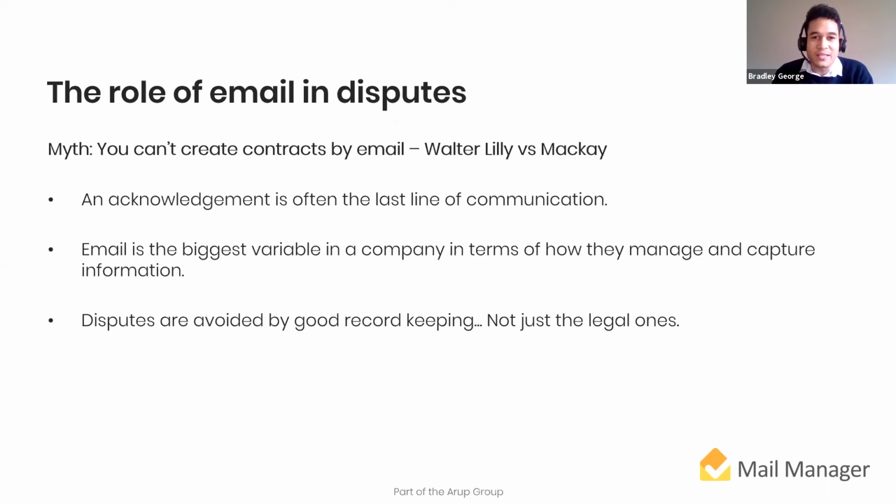People don't often realize how important emails are until they essentially have to go back and find one, whether it's receiving a critical document during the project or having to go back a few years to see who was speaking to who, or who authorized this or that. Email is now the biggest form of communication on a project. However, it's the one thing people tend to manage differently, as well as legal disputes. If, for example, you have an organized project manager who's keeping really good records, it can really help project disagreements be resolved before it gets to the legal claim stage.